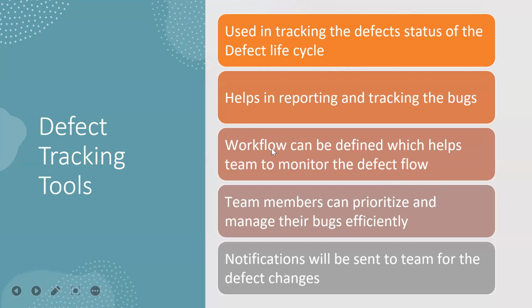Workflow is nothing but, when development starts, before starting, it should be in the To Do status. This is actually not the defect workflow, but the workflow of the complete project. They will define a different set of workflows for each project. So it should be in To Do before the developers take a story for coding, and after that the status should be In Development.